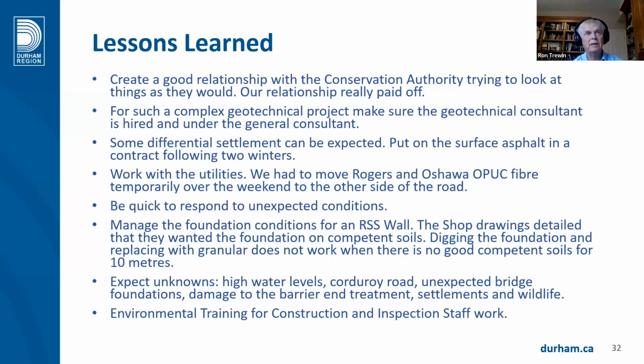Some differential settlements can be expected. Put the surface asphalt on after 2 winters. There were some areas that did settle. It wasn't a big deal. It was just additional asphalt in resurfacing, and they were dealt with. Work with the utilities, especially Rogers and Oshawa PUC Fiber. They moved their plant over the weekend. And be quick to respond to inspected conditions.